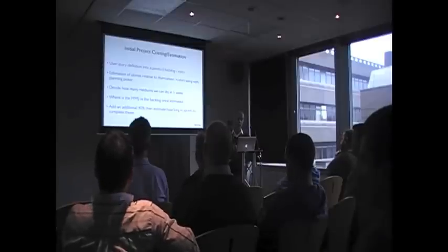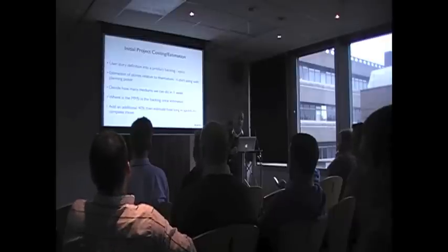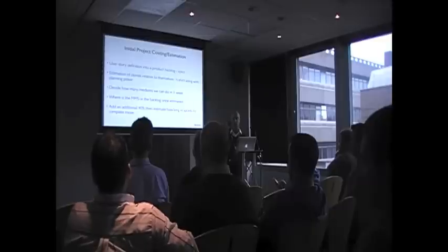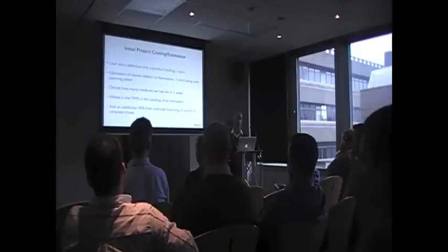And then we do t-shirt sizing. It's a really rough way, but surprisingly quite accurate, of estimating those stories, and we use small, medium, large. For instance, if they needed a news section on the website, there's only a certain amount of things you can do. You need some data folders, you need some articles, you need to list them out. These are called epics because they're quite big user stories. But you can say, well, that's a medium task. A news section is quite simple in Umbraco. That's a medium. Massive CRM integration with web services, that's obviously a large. Panel on the home page, that's a small.